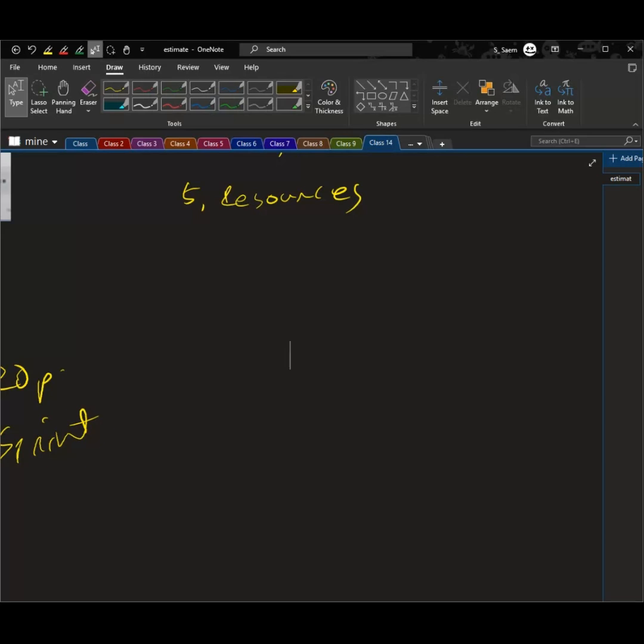So, story refinement and points. Only refined stories with assigned points qualify for sprint planning. A story requiring more than 8 points, which is the Fibonacci sequence limit, is split. For example, a 10 story point story becomes two subtasks, like 8 points and 2 points. If the requirements change, the test plan must be updated.